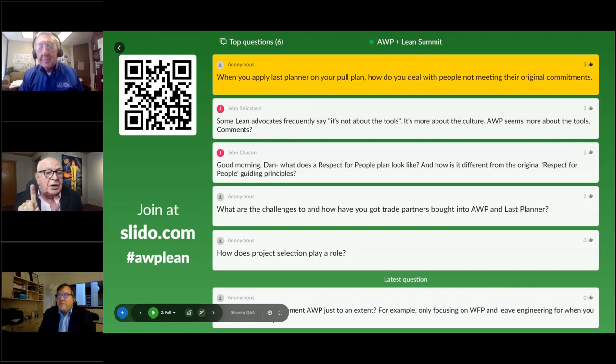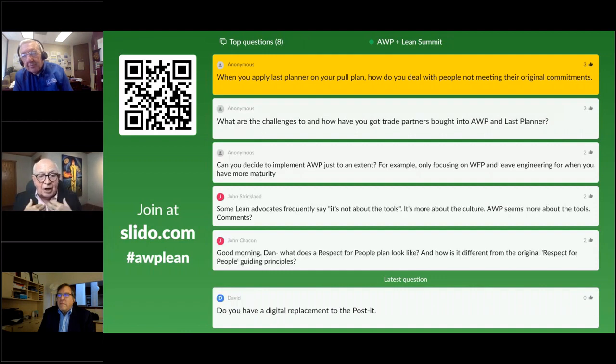We don't shame people, and we don't deal with the metric. We call it PPC, percent of plan complete, or percent of promises complete is my preferred phrase. We don't deal with that on an individual basis. We deal with it on a team basis. So there is team pressure to keep our reliability higher. Without last planner, it's 54%. Half the time, people do what they say they're going to do, and half the time, they don't. And with last planner, with almost all of the teams I coach, it's 80 to 90%. And that's a huge difference.